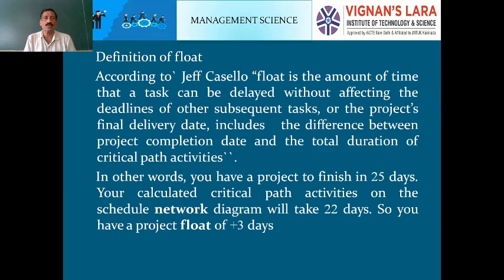Let us go to know one definition of float. According to Jeff Castillo, float is the amount of time that a task can be delayed without affecting the deadline of other subsequent tasks or the project's final delivery date. It includes the difference between the project completion date and the total duration of critical path activities.